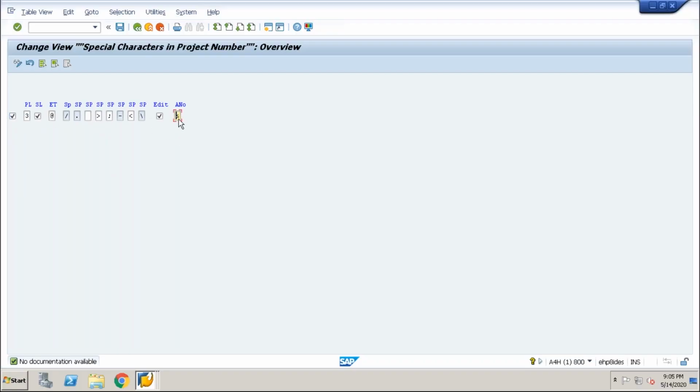Percent sign. Yeah. This percentage sign is, in short, so you can enter the values directly in PS. Short in the sense of the ampersand sign. You no need to write the full code every time. You can use the ampersand sign. The system will consider its parent level and then it will consider as per the coding mask.